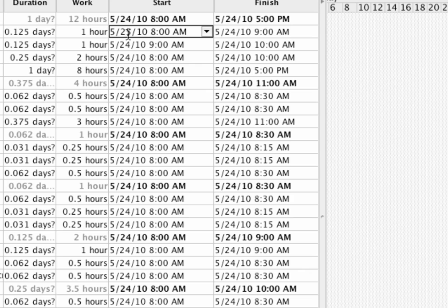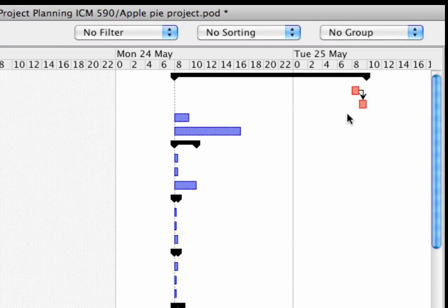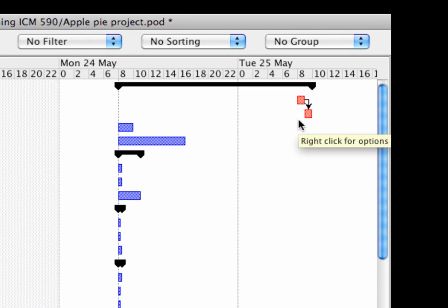25th, you'll notice that the second item that's dependent on research sources, select 3, moved automatically with it, maintaining that dependency, meaning that I cannot select 3 menus before I research the sources.